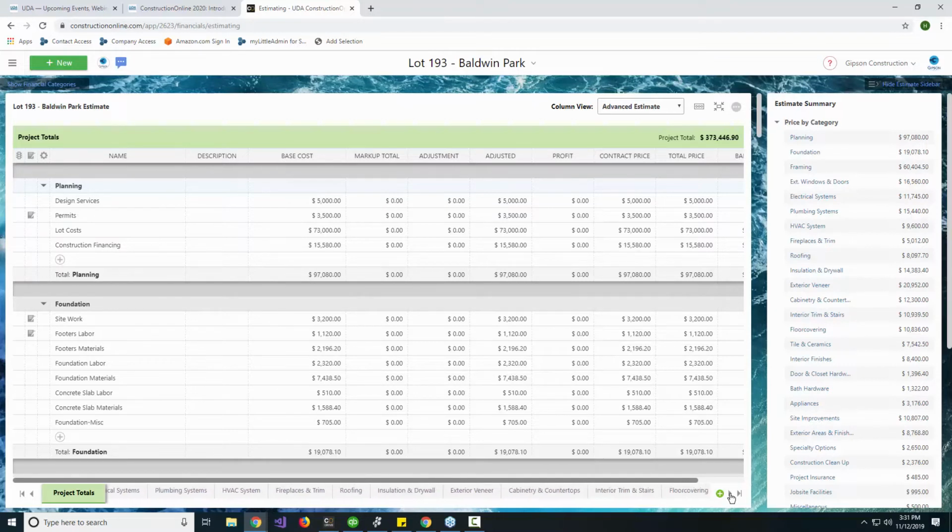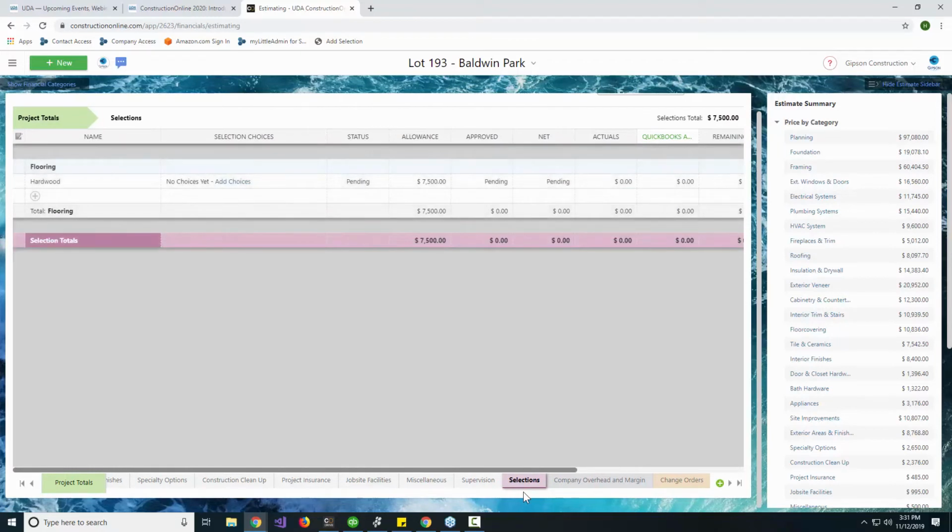And certainly that is a part of putting together the estimate or budget for any project. There usually will be times where we need to assign a line item, but the client has not made a final choice about what they want. We see this a lot on residential and light commercial work where maybe finishes are being chosen, or specifics of things like flooring or appliance packages are being chosen. And so we want to be able to account for those in such a way that really sets up the client to be able to choose that within the portal and have those allowance amounts managed.